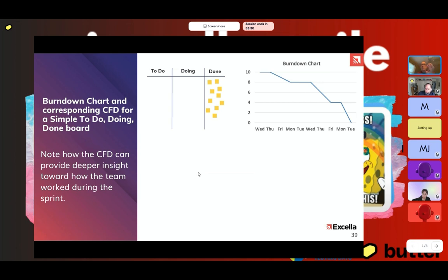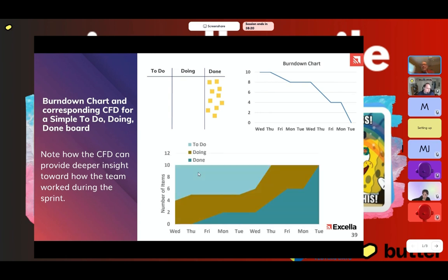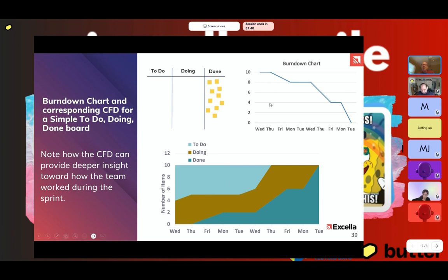Here's another basic to-do, doing, done board. This burndown might look a little better — we're finishing things more throughout the two-week sprint. Again, this is what the done line looks like; this is your burndown, same thing just turned around and upside down. But look at the extra information a CFD gives you: we know we didn't start everything right away — we opened up four items, then one more, then things were static for a while. Even for a basic board like this, it's worth gathering this information and not just relying on a burndown.